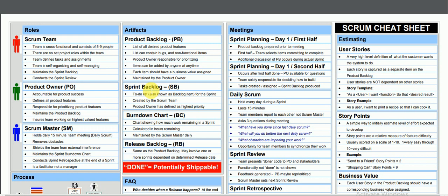Let me assume the release backlog has 10 stories. In a 2 weeks duration we may not be able to complete 10 stories. So let me assume we can complete only 5 stories in 2 weeks. Then that release will have 2 sprints, and each sprint has 2 weeks. In the first sprint, the top prioritized 5 stories will be there. We develop them, test them, showcase them, and deliver to the client. Second sprint, again 2 weeks, the remaining 5 stories. Again develop, test, showcase, and deliver to the customer.